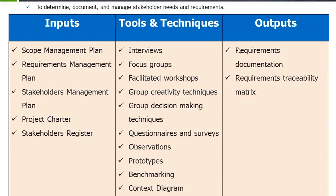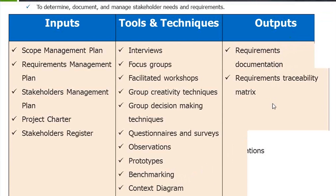Questionnaires and surveys are used when you have to get information from a large number of people. I also explained the term benchmarking, and the outputs are the requirements document and the requirements traceability matrix.